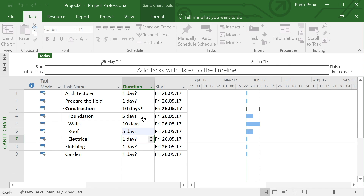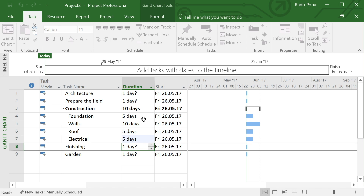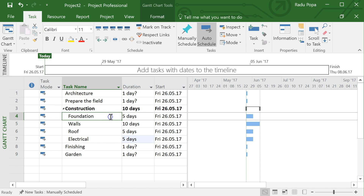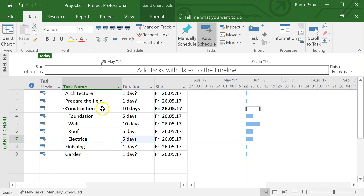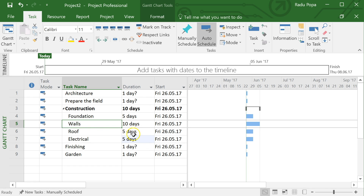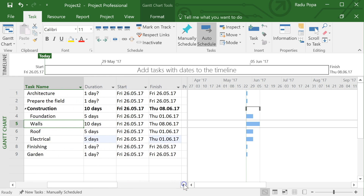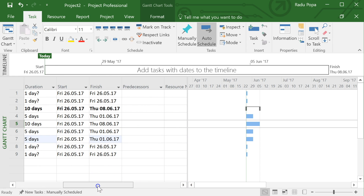Now I'll set some durations: the foundation takes five days, the walls will take ten days, the roof another five days, and electrical another five days. These are totally random numbers — I'm not actually evaluating how long things will take. What I really like to do is to set up dependencies between these tasks.